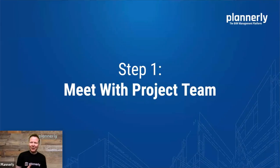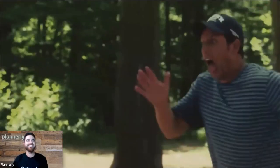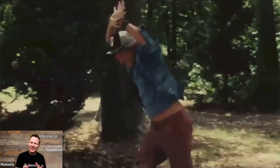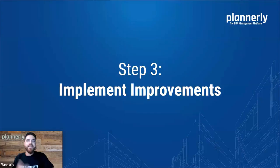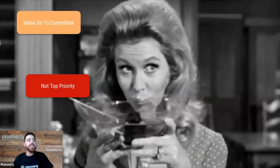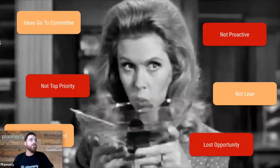When we finish a project and we've got this great idea that we're going to gather all of these lessons learned, we have to meet with the project team. Usually we find that they're running away from the project as far and as fast as they can — they're already on another project and it's very difficult to get them to come back and tell you what happened. They just become busy naturally. When they do come back to gather lessons learned, we tend to find ourselves sifting through old notes, meeting minutes, things that we can't even remember. We end up with a huge list of improvements and sit there wondering how we're actually going to implement these. All of these ideas end up going to a committee, they aren't really a top priority, they take ages to implement, they're more reactive than proactive, and ultimately we end up losing another opportunity.